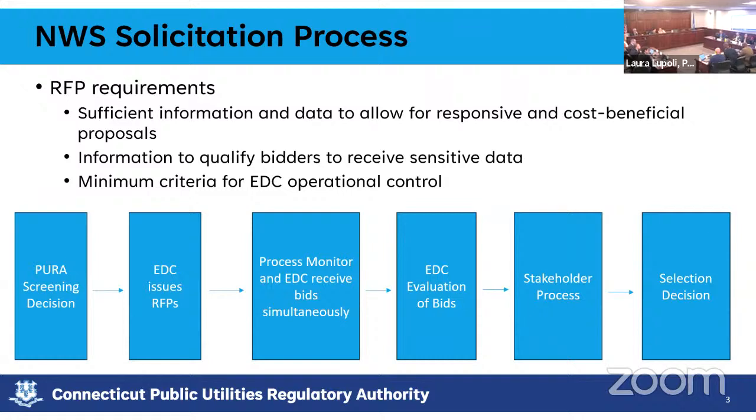Yes, I entirely agree that the vendor will have more clarity if they have a range of where they're going. But again, in no other procurement do I go out and tell the vendor, I've got $3.5 million to spend on this, you better be under it. We want them to look at the scope and come up with a solution at the best cost. Because if we're wrong in that cost estimate, the $3.5 million that we're willing to spend, they might price it at 3.4 and walk away with a $1 million margin on this. And if the intention of the program is to find the lowest cost solution, I wouldn't encourage that. So that's the downside, right?